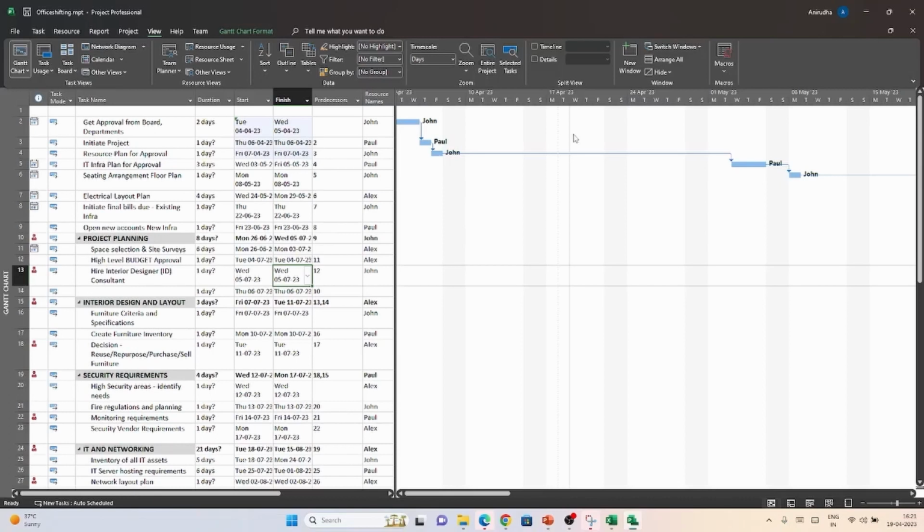Ideally, you should update progress with a weekly interval. And I do this a day before I have to send my own weekly report to stakeholders. You should ask for team status update a day even before that. I'll go through the tracking process step by step now, like a checklist for you to follow.